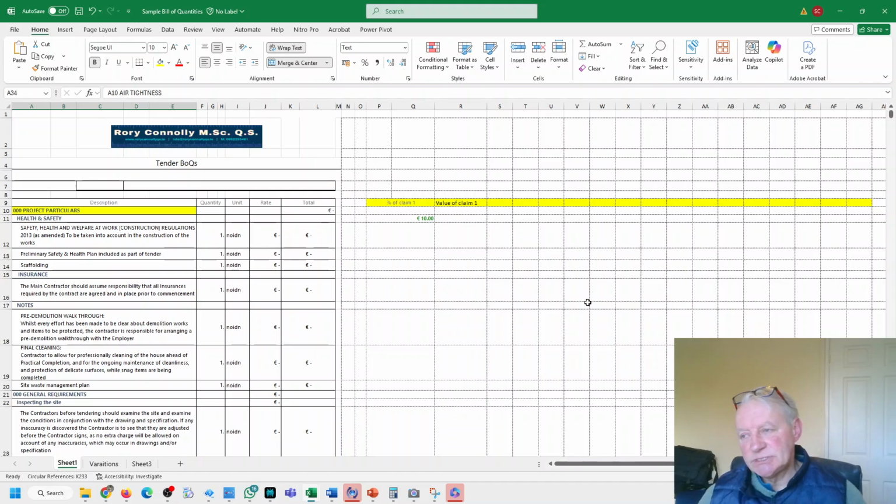The first reason is to tender, and then you're comparing apples with apples, rather than pears, bananas, and all sorts of other things being thrown at you. And I've got to be honest with you, it's a bit of a red flag for me when contractors send back tenders that are not uniform and don't use the bill of quantities. Some of them have their own system, but when you go through it, it doesn't compare, and it sends the wrong message in traceability and accountability.